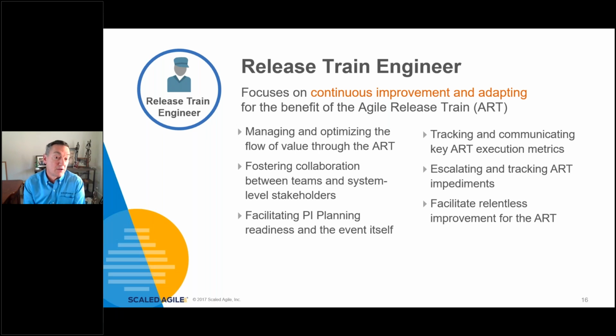So it's commonly good that a release train engineer has influence and has connections with that broader part of the organization. So if a Scrum Master has an impediment on a team, but it's not something really solvable by the team, that might be where we raise that impediment beyond the team up to the agile release train. That impediment would be brought up to the release train engineer. So it really helps when those folks have connections within the org and can run down these types of impediments.